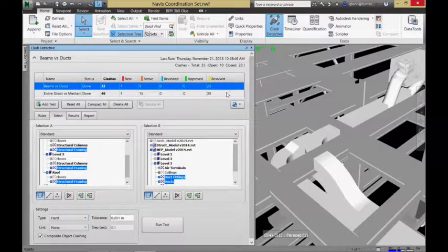Although, interesting. Now, I should pay attention to what's going on. Notice what's happened. I moved that thing on down. There are still 33 clashes, although 23 have moved into the resolved category. So even though there are 33 clashes, do not be dissuaded by that. By just moving that one duct down to 9 feet, which may not have been the best architectural thing to do, I actually have 23 resolved. I only have 9 that are still considered active, and I actually created one new clash for myself.